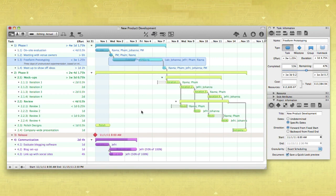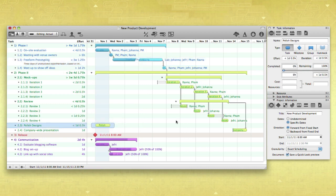Another type of unique task is a Hammock Task. These are the types of tasks where the amount of time it takes to complete them is dependent upon the completion of the task that comes before it and the start of the task that comes after it.